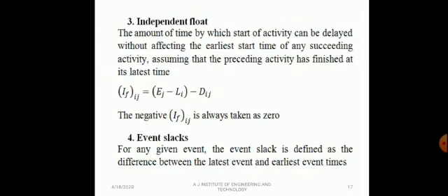Independent float. Independent float refers to the amount of time by which the start of an activity can be delayed without affecting the earliest starting time of the immediately succeeding activities, assuming that the preceding activity has finished at its latest finishing time. In other words, it refers to the excess of minimum available time over the required activity duration.